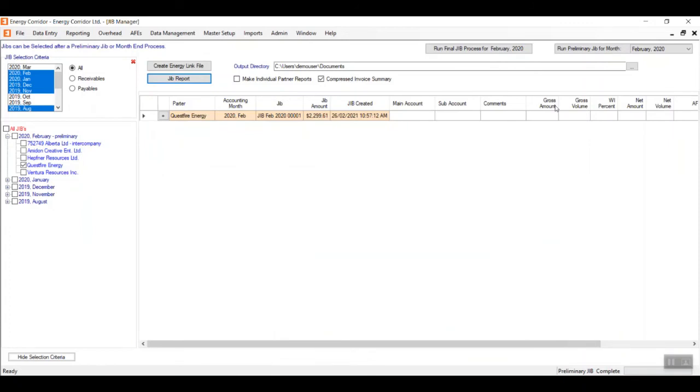So that, in a nutshell, are the cash call basics. Of course, there are many situations that occur that you need to account for. For example, as you can imagine, projects are usually over or under budget. Refunds and additional funding requests are common. Partners don't always pay the full cash call amount or pay too much, etc., etc. We've listed most of what we could think of on our operated cash calls blog, so check out our website.